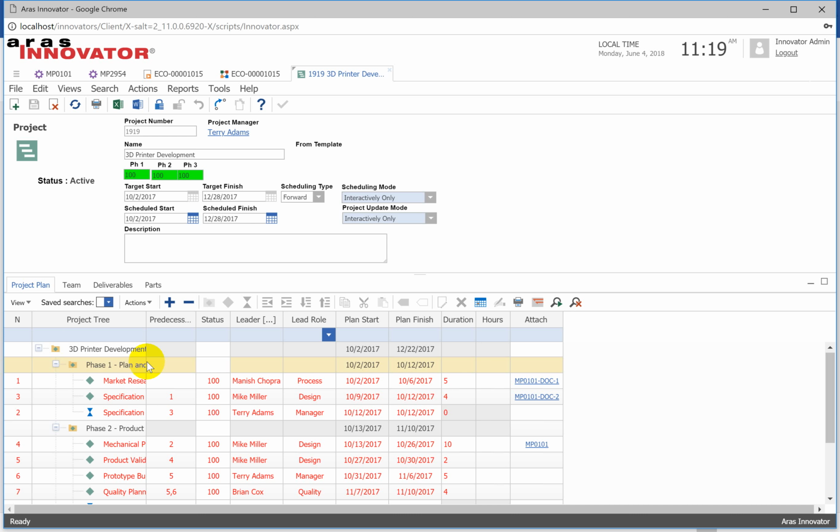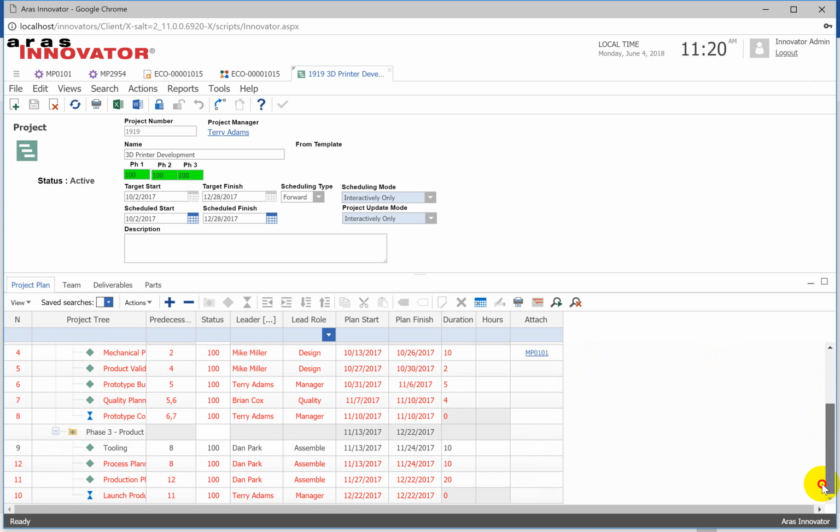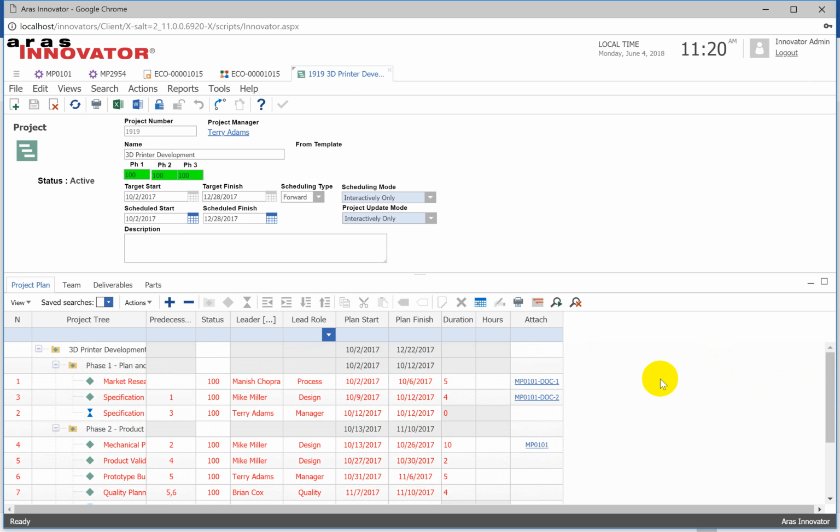in ARIS, and it'll automatically update this project tracker, which will then update the project plan with percentage of complete and with the completion status on every single task that's defined as part of each phase in the deliverable. So the project manager in an ARIS environment doesn't have to be the administrator that has to update every single task within the project plan.